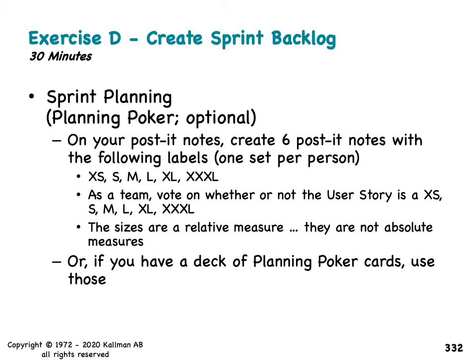In creating the sprint backlog, some of the teams will use planning poker. It's optional. And we actually download an app these days. And in older days, we used to create post-it notes with extra small, small, medium, large, extra large, triple X large. And that was when we were working with the product backlog and trying to size a whole backlog using t-shirt sizing to give us a relative measure, because these aren't absolute measures at all.